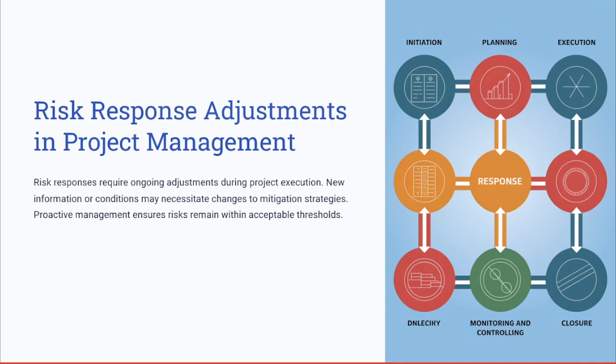Recall that one of the outputs of monitoring the risks is updating the risk management plan or the project management plan, including the risk register. So, what can be updated on the risk register? One of the things which can be updated is the risk response adjustment or strategies.